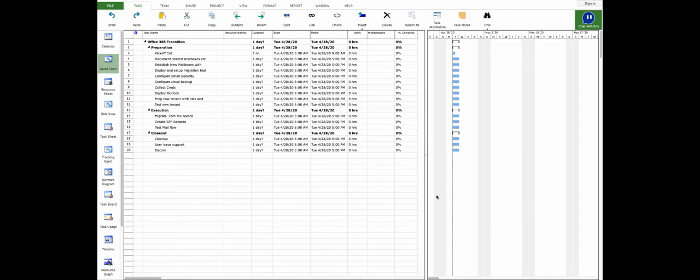So once we're on our kickoff call, we'll typically identify a few key items here, specifically, when we would like to do our migration. Changing this date will help dictate a critical path in our project, as the migration of the record is sensitive to a lot of the tasks that are in preparation. So for demonstration purposes here, let's pick a day, let's say May 20th, for our cutover.